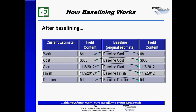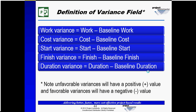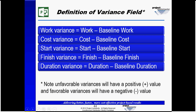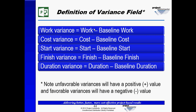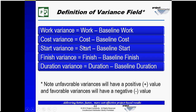As we begin to look at variance analysis, we now see how Microsoft Project automatically calculates the difference between the original estimate and the current estimate. For example, the work field, or the current estimated work field, can be different from the original baseline work field as the plan changes. The same is true for cost, start, finish, and duration. So Microsoft Project will look at the difference between the original estimate and the current estimate and generate these automatically calculated fields called variances.